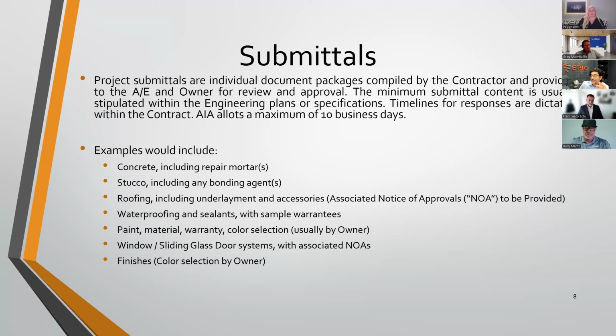It's important to get these items out of the way on the front end so that there is no question whatsoever what's going to be utilized. So that once the inspecting engineer is on property doing their progress inspections, there are no surprises. They should expect to see Meramix on there as their stucco, Sika something or other concrete, and Suprema roofing products. And if they don't, that's going to start raising some red flags.